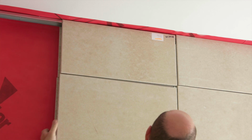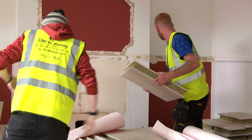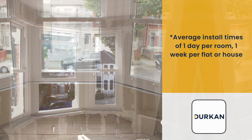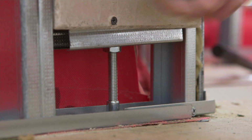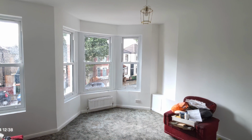Because it's made off-site, it can be all surveyed, the panels turn up. We're looking at doing a day per room. So in the majority of these flats and houses, work's finished in a week. If we were doing external wall insulation, we've got all the issues with the planning, but we've got pretty much a 4-week program. We're trimming 3 weeks off the program.